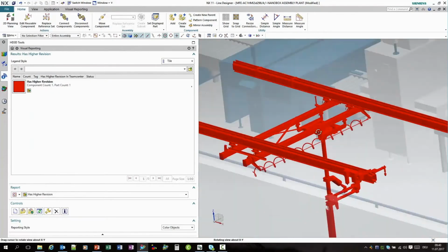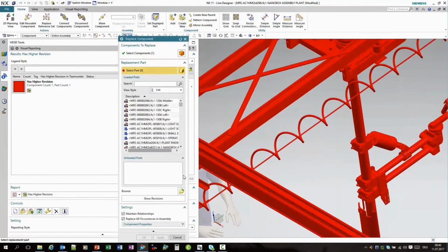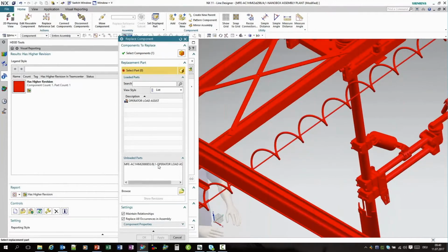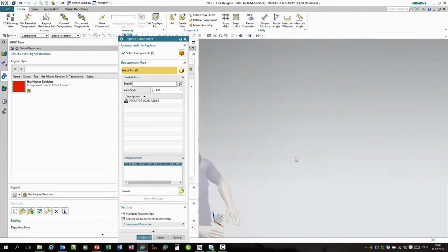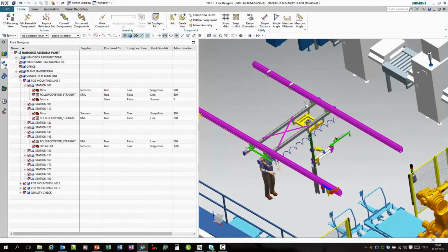So I can see that in my example here that I had up for diagnostic, that means somebody's working on it, it's not finished, it hasn't been released. So I can actually see that part, find it, so I know from a purchasing standpoint or from a project management standpoint where my entire plant is. And I'm using these visual systems to do it. So I can actually check for long lead time items and make sure I got all of those released and out to purchase orders cut, so I get those things in on time so I can meet my due dates on the plant floor. So this visual designer is a great tool to help me just see what's going on from a project management perspective.